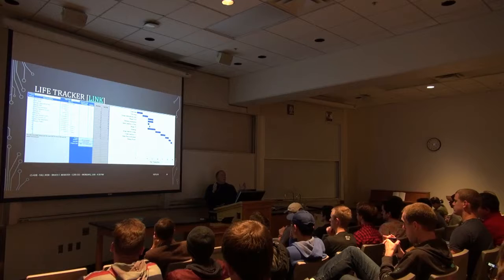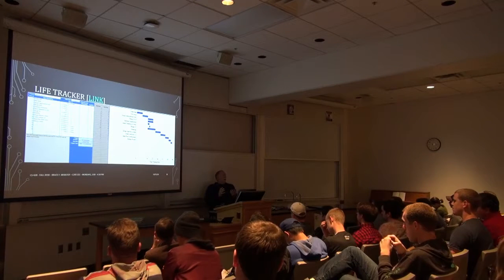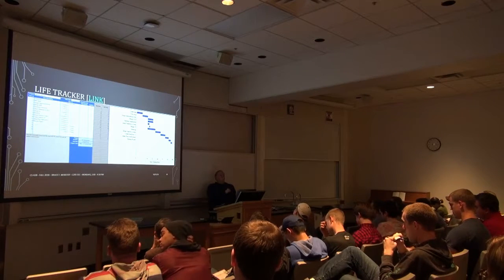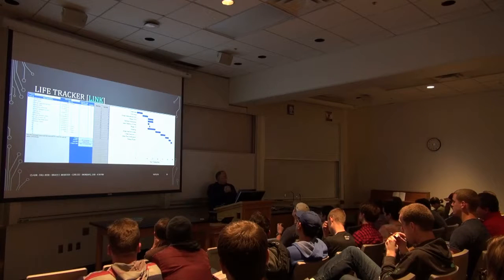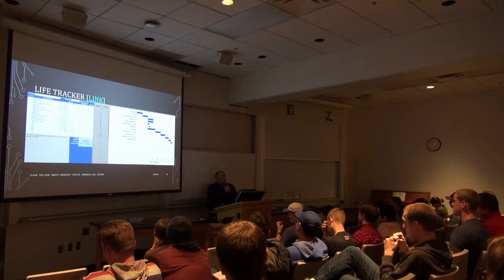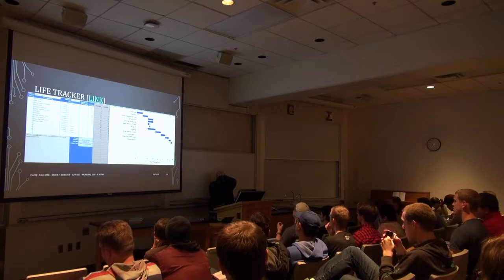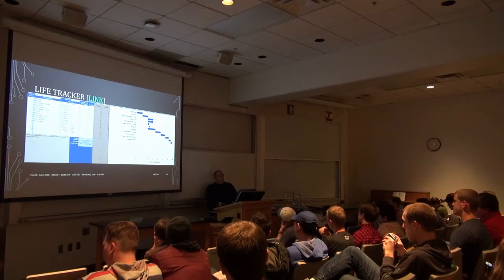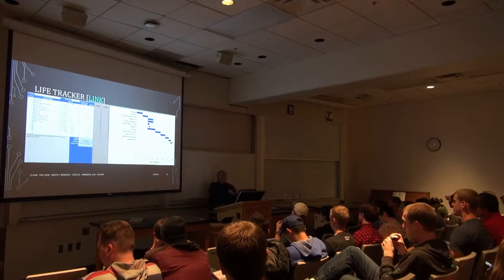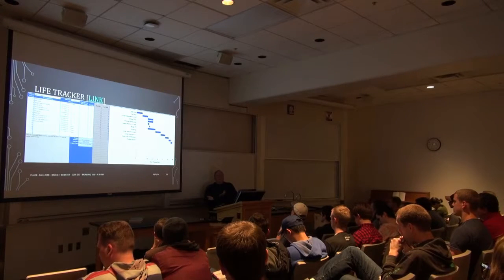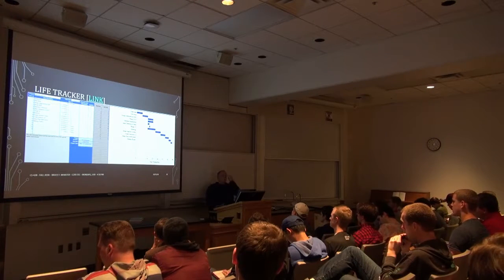And the developers and programmers involved said it was almost sheer luck. We flushed out the critical bugs early. We used a lot of chewing gum and baling wire, and we incurred a lot of technical debt. And they got it up there, and management's response was not, oh, okay, that's great, now go back and take the time to clean up all the stuff you did quick and dirty. They said, oh, that was great. Now we want version 2.0 in the same time frame. And the developers were like, no. And we got dragged in because it wasn't on the same time frame. And what we said is, guys, it's a miracle it shipped on time the first time. You're now asking for a miracle a second time in a row, and you're doing it on a much weaker infrastructure because there is all this technical debt.